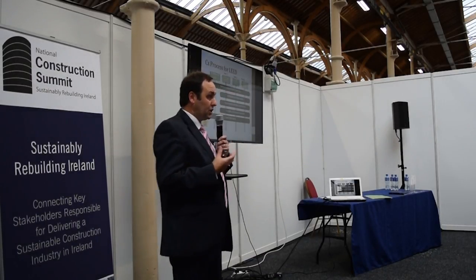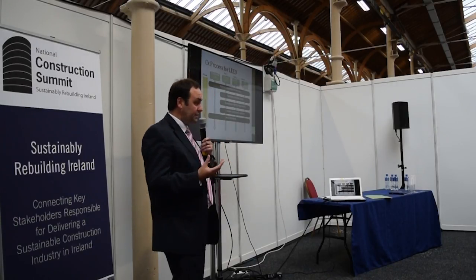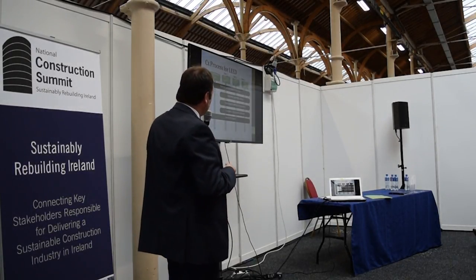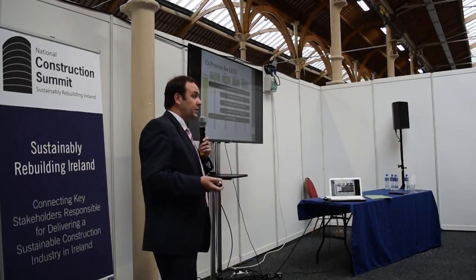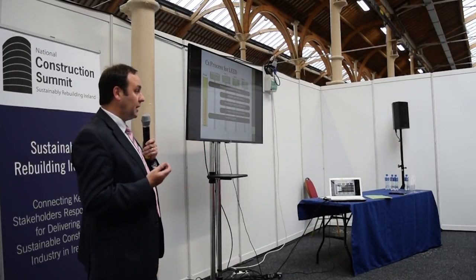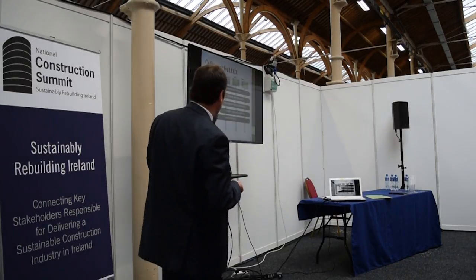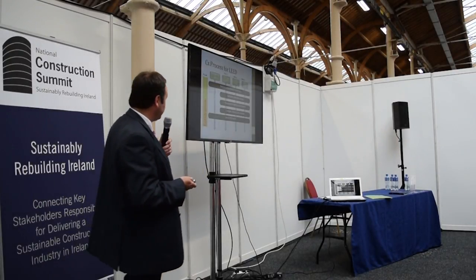So the CXA, the commissioning authority, will review those technical submittals before they go through to the design team. And this is based on the energy and the water systems for the actual building. The construction checklists are then compiled for enhanced commissioning, and there's no point in reinventing them. It's not obliged that the CXA actually creates the construction checklist. An awful lot of the subcontractors have their own. It's a matter of making sure they're included into the commissioning plan itself, and obviously verifying that the test and balance reports are all completed.